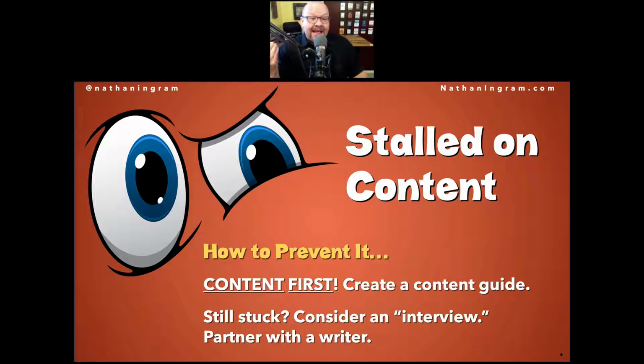So the way that I help clients step through this process with content first is that I create what I call a content guide. The content guide is basically a really long Word document that asks a bunch of proactive questions about everything that we're going to need to build the website. For example, it starts off, if they have a domain name registered already, we ask them for the credentials to log in to the domain. And we talk about how they handle email and those sorts of things. But then when we get to the actual content of the site, let's just say, we're talking about the About Us page.